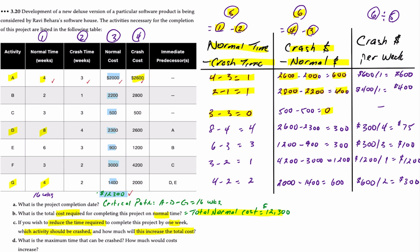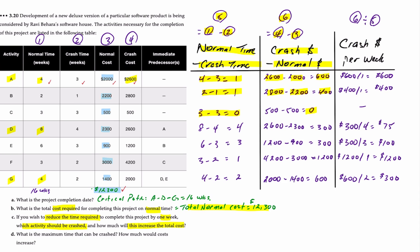You can pause the video to confirm all these numbers. The last column is the most important — it gives us the crash cost per period, or per week. We take column six divided by column five. For activity A, the $600 difference divided by one week equals $600 per week. Activity B: $400 divided by one equals $400 per week. Column five also tells us the maximum number of weeks each activity can be crashed.